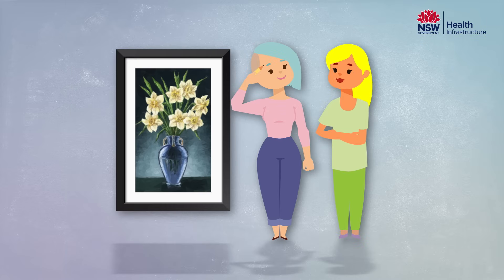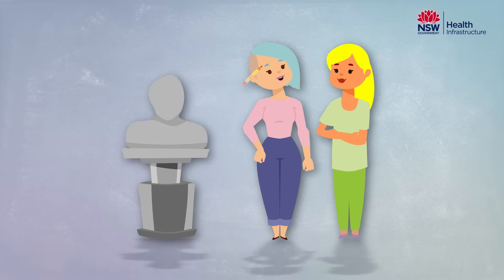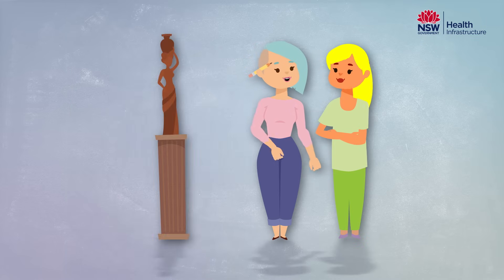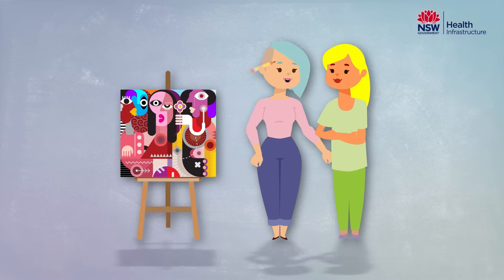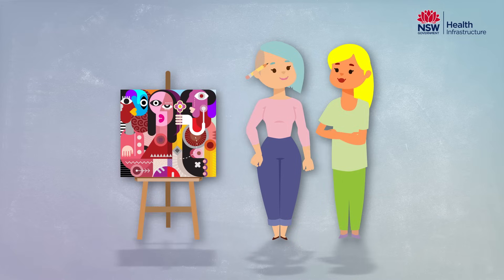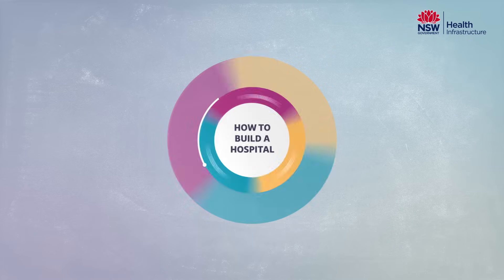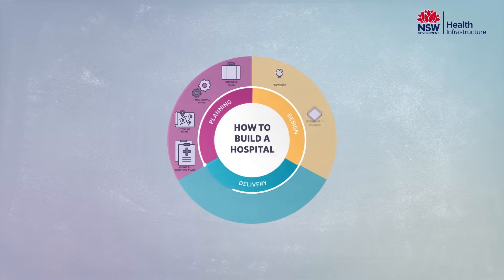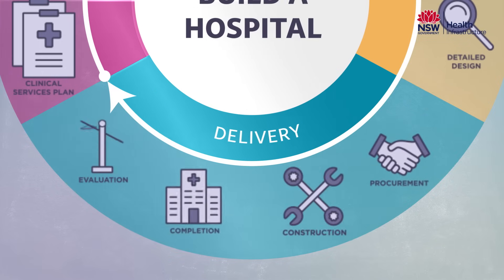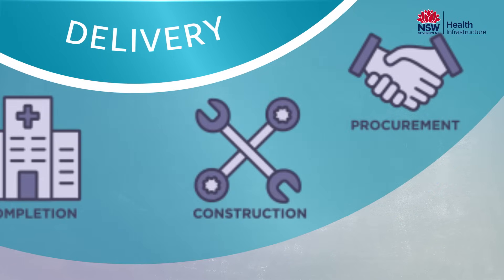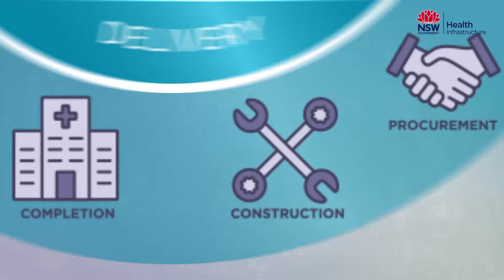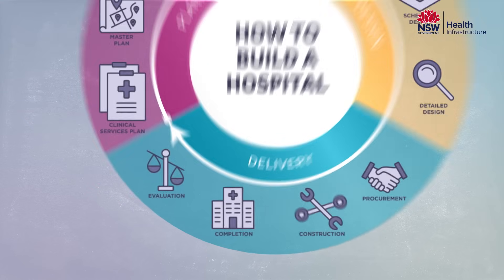At this time, we also develop an arts and cultural strategy to give the facility a local, bright and welcoming feel with artwork, installations and way-finding signage. Once our detailed design is finalised, we move into the delivery phase. This starts by issuing a tender to engage a construction company that can build a high-quality health service on time and to budget.